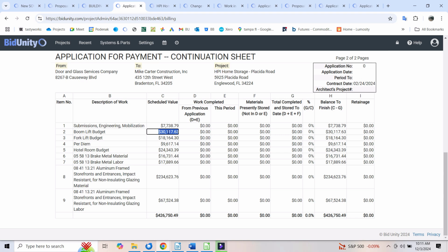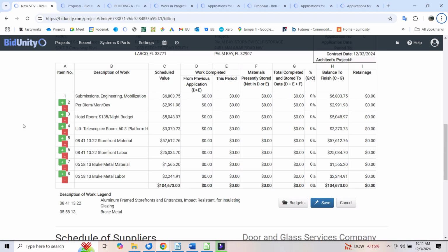because if we are going to need, for example, well, let's look at a different job. Yeah, the current job is a perfect example. So per diem, man day, I'm billing them at the end of the month. I'm getting the money back 2 months later. So whatever I pay in per diem per man day, I'm going to get that back 2 months after I pay it. But I can't pay all of this money. I can't earn it. I can't complete it.